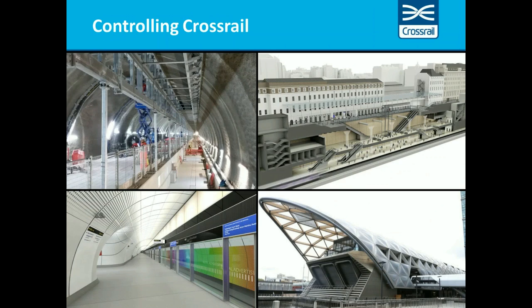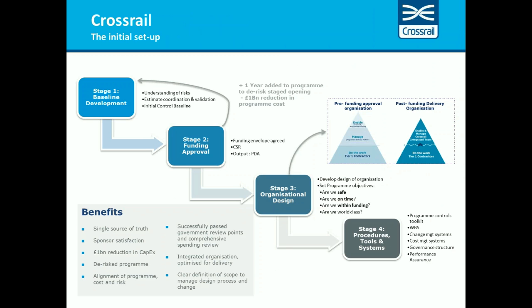So moving on to the body of the presentation, overall this slide depicts approximately 24 months on the timeline in what we've described as Crossrail's official setup phase. Starting in April 2009, running through to December in 2009, stage 1 is where we got the volume of the work done and completed. We had to define the scope and write the scope book. We had to also agree with sponsors all of our functional requirements. We had to ensure all the obligations that were agreed to in the hybrid bill were captured in that scope document, of which there were some 4,000 items.